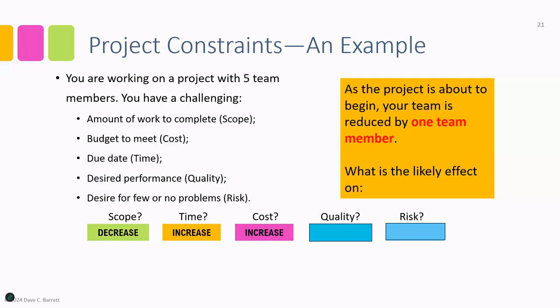It's probably going to be overtime. We're going to have to pay time and a half or increase wages. Our team members might start to get a little tired because they're working, say, 12-hour days or something like that. So mistakes can be made and so on. Things become less efficient, which is an upward pressure on the budget or the cost.